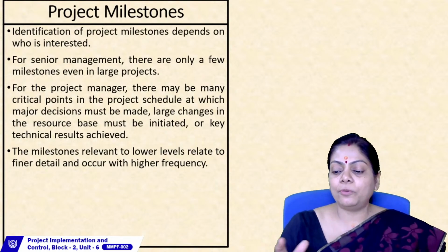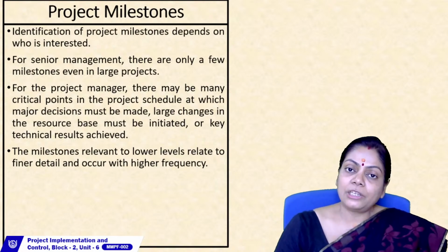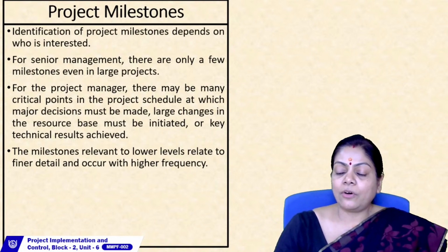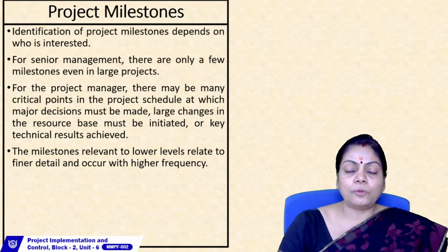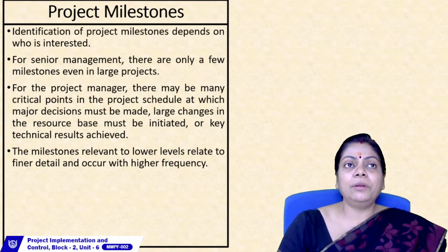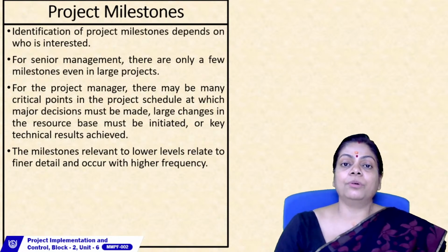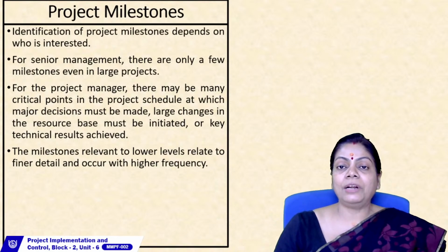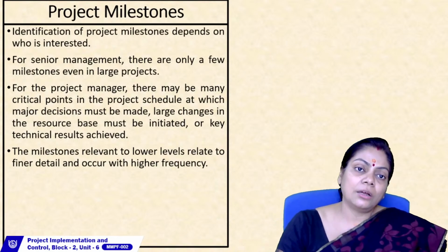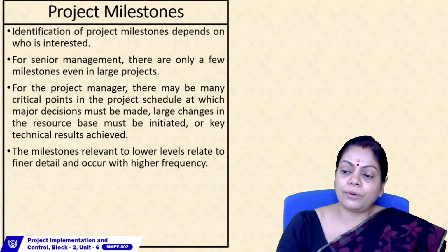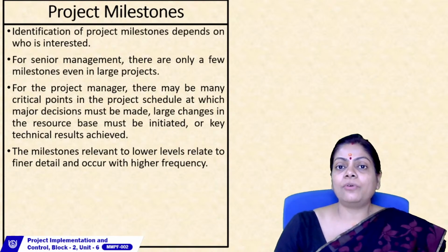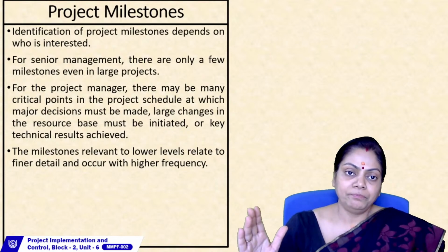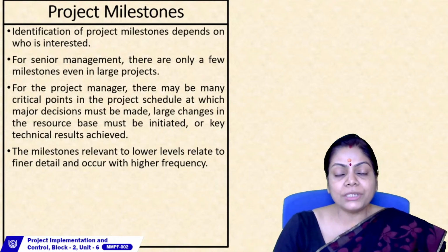So the casting of the grade beam could be the first milestone, and you might have decided that, suppose we are starting today, the grade beam has to be finished within 3 months, and the budget allocated up to the grade beam for this residential house is, let us say, 20 lakh. So now you have the first milestone.